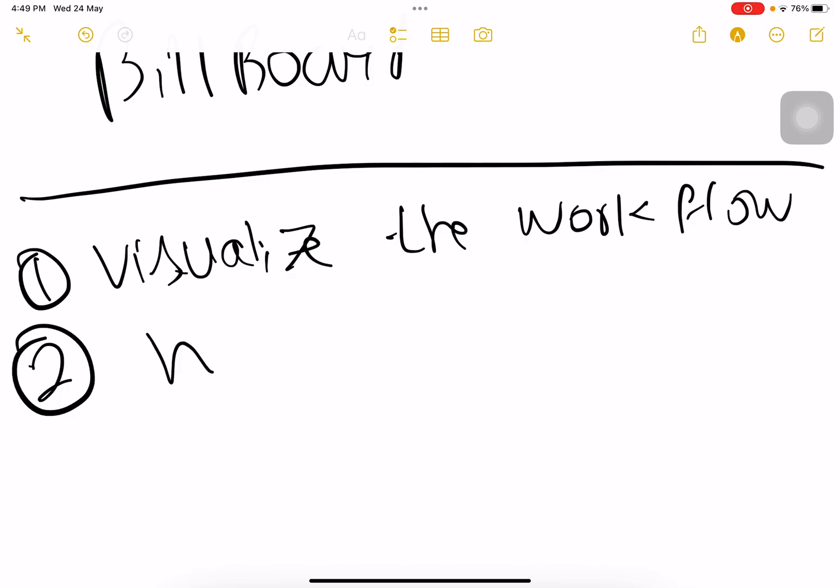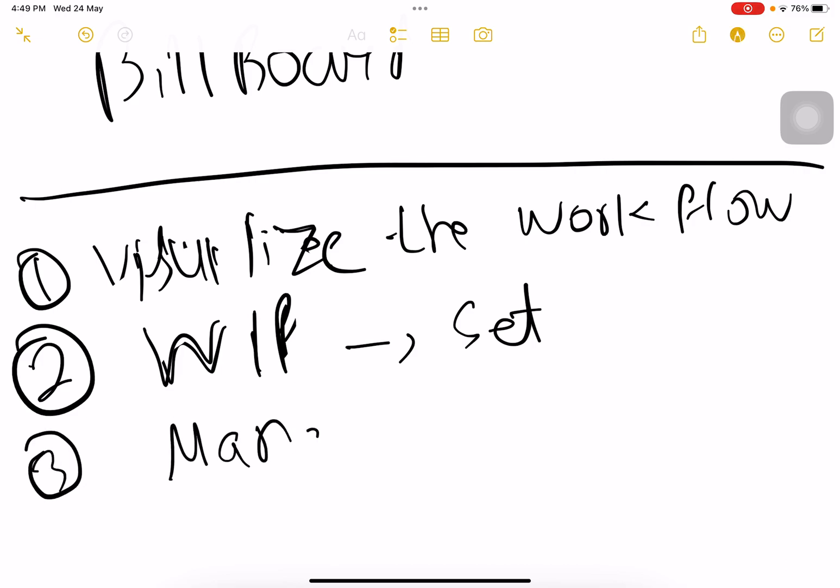Second thing is put work in progress limit - how much work you think you can do. This work in progress limit can be changed along the way, but at least you set the limit initially and keep on changing until you reach the next stage, which is the flow stage.